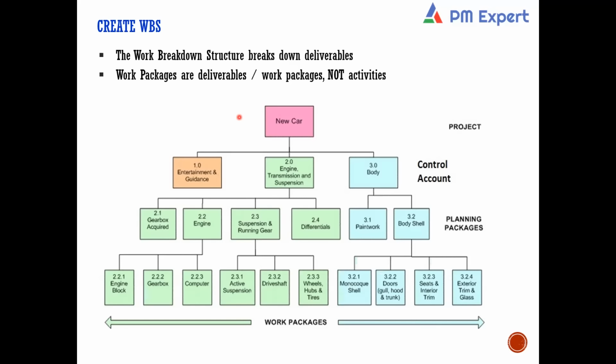Yes, can. Now, another important thing, there is a rule called the 100% rule, which is often used when we talk about WBS. What does it mean when we say 100% rule, guys? 100% rule means whatever is there in the WBS is only in the scope of the project. Anything beyond the WBS will not be included in the scope of the project. Is that okay? Whatever is there in the WBS will be in the scope of the project. Anything outside the WBS will not be in the scope of the project. Is it fine?